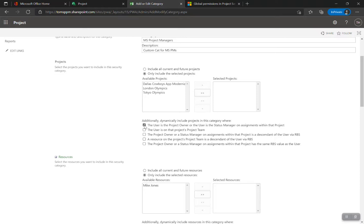The dynamic options include: the user is the project owner or status manager. When you create a project in Project Online you are the status manager for every task. If you change the project owner but don't switch out the status manager column in Microsoft Project, you may continue receiving timesheet updates for those tasks — so when switching ownership, switch out the status manager too. Also: the user is on that project's project team — for this category, if I'm a resource on someone's project team, I don't want them performing the actions I've allowed in the group.